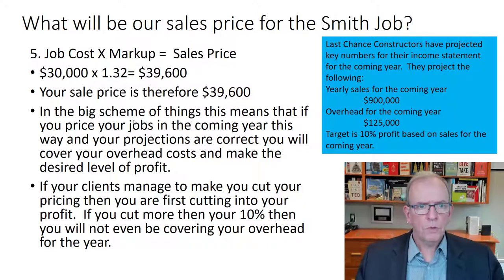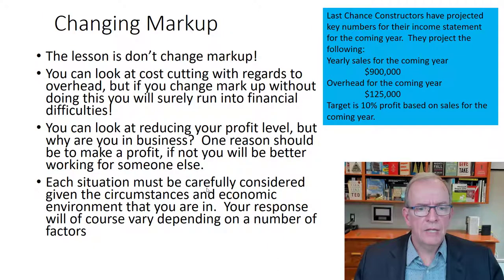All right, so we have that, and what I really want to emphasize then is be very careful not to lower your price without lowering what you're providing. It's okay, yes, we can do it for $36,000, but in that case, we won't go with the granite countertop. We'll go with this nice laminate instead. There's your $3,000. So you're looking for something that you can barter with or negotiate with.